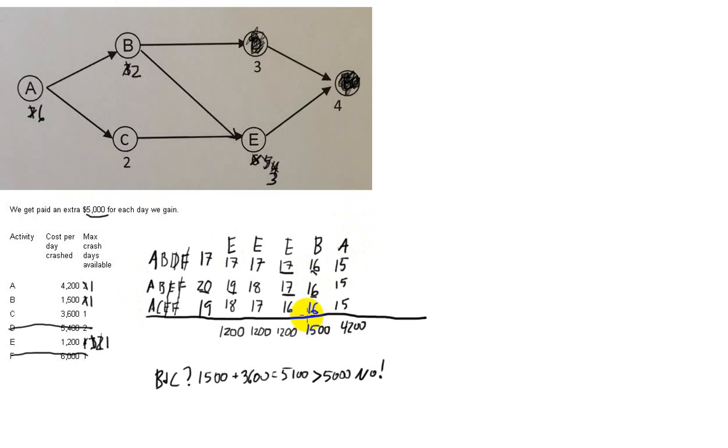They're all critical. So the only way we can speed them all up is to do the same thing and crash A. Now anything with an A is down to 14 days. But they all have A's in them, so they all go down to 14 days.